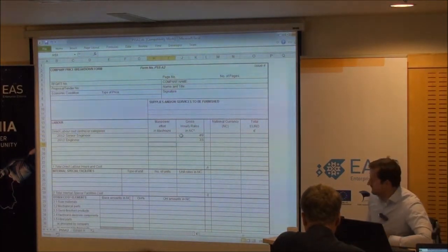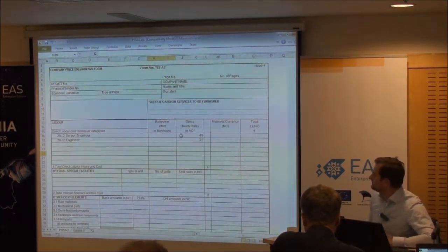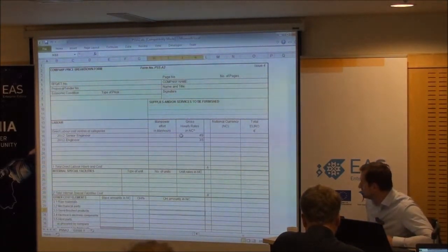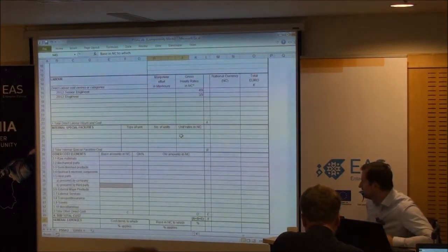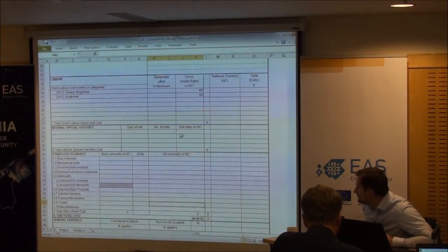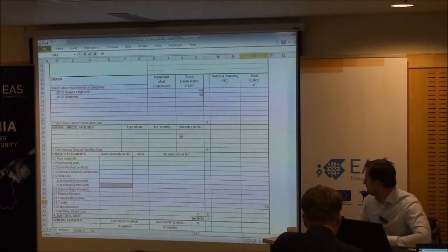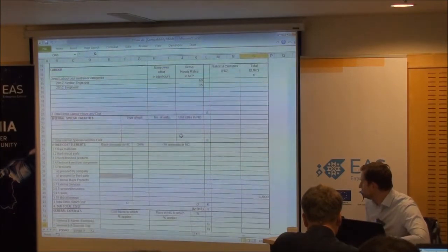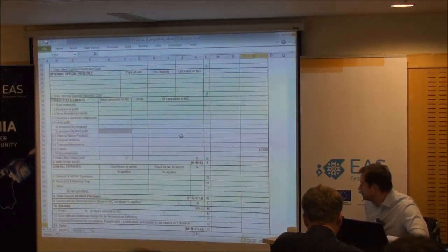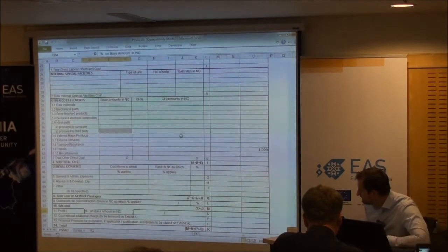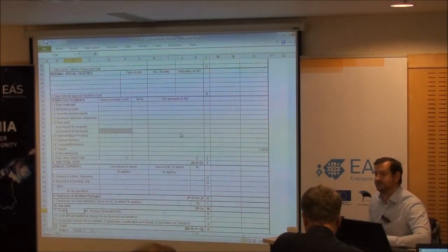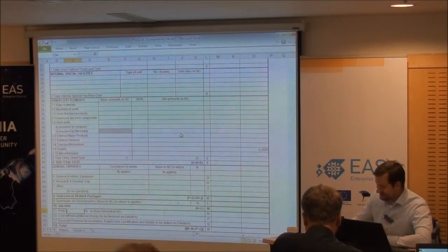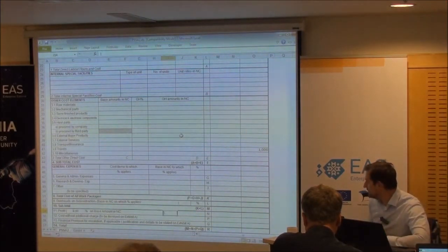Okay, so we've got those. I'll just put the fixed costs in at the moment that I know, which is travel. We've put 2 travels in there. That's €1,000, €1,000. Nice and easy. The profit that you're allowed to make will most likely be determined within the proposal. It'll normally state you can make 8%, which is typical. So we'll use that margin on this.